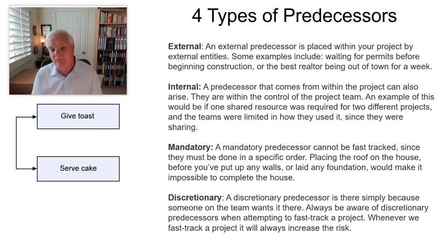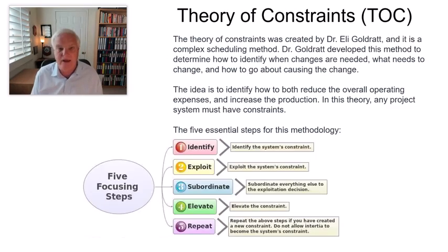A discretionary predecessor is there simply because someone on the team wants it there. Always be aware of discretionary predecessors when attempting to fast track a project. Whenever we fast track a project, it'll always increase the risk. So don't forget that.